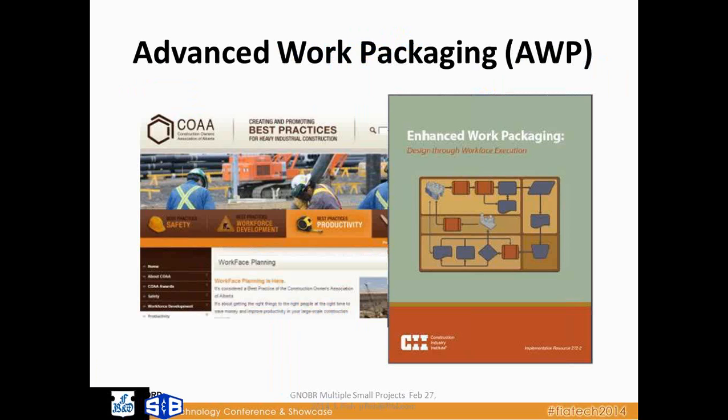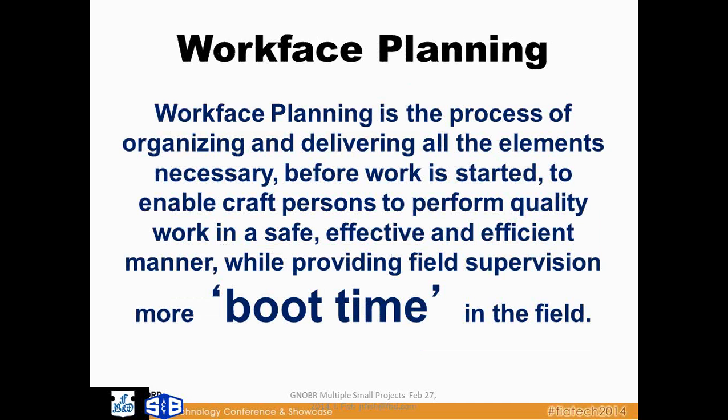And this all comes out of the advanced work packaging study. They call it enhanced work packaging. Some people call it workface planning. It's got many different names. But what it means is to divide the work up in a way so that I can hand the crew the information that they need to do their work. So, next slide.